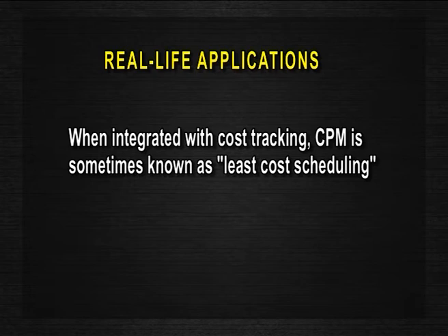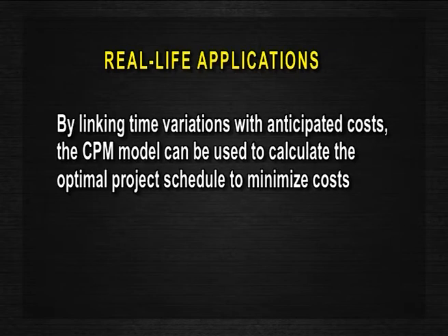When integrated with cost tracking, CPM is sometimes known as least cost scheduling. By linking time variations with anticipated costs, the CPM model can be used to calculate the optimal project schedule to minimize the cost.